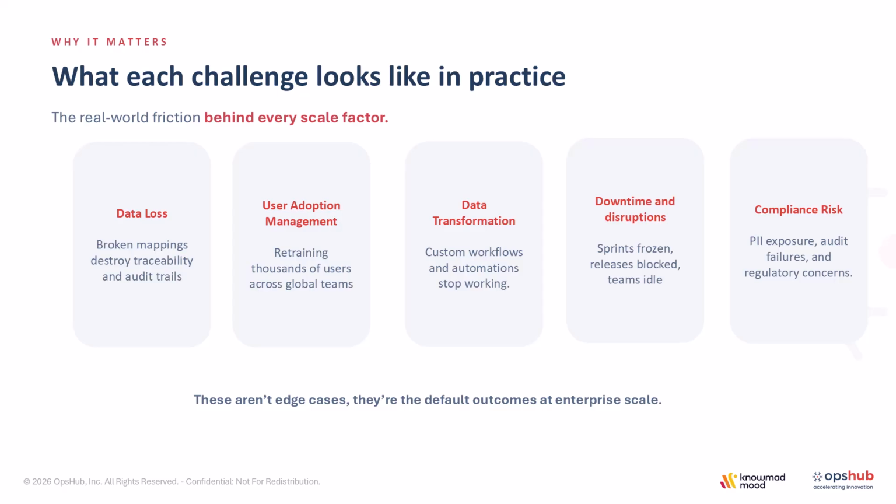We had to take some decisions about the different kinds of fields and information you have in the source and how to transfer it to the new one. Sometimes you don't need the information. Sometimes you need to split it and then you have to make some transformation. Many different roads there. Downtime and disruption: it has to work. Once you start migrating, even if you are doing it by steps, you cannot allow downtime and stop the service. We have already talked about the compliance risk. Okay, next please, Bobby.